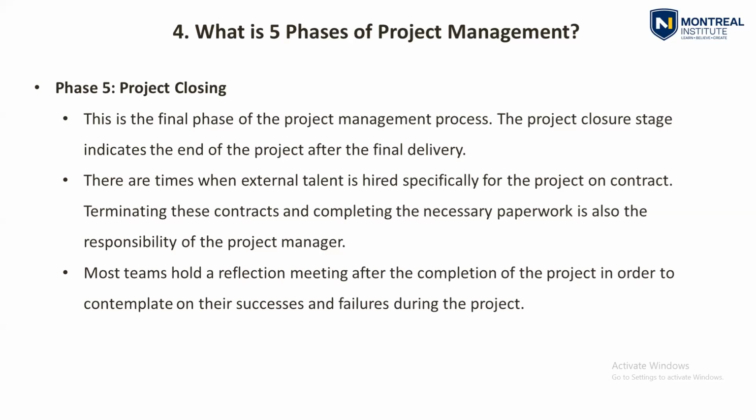Before demobilizing your team, it's better to have a reflection meeting, and you can ask each person what has gone wrong in this project and how we can overcome these issues in the next project. You can also ask what has gone very well in this project and whether we can implement it in future projects.